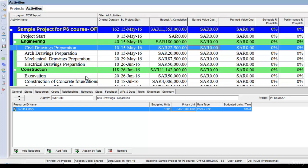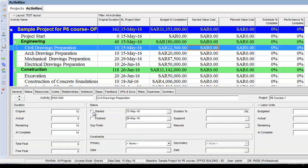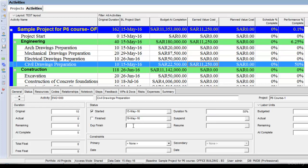Now the project has started and I'm going to record progress after five days. The current data date is the 20th of May. I'll go to the stats option, click start, and put the activity completion as 50%. So civil drawings preparation is 50% complete after five days. You can see the performance percentage complete is 50% and the earned value cost is $11,250, which is 50% of the budgeted completion. The earned value cost is calculated by multiplying budgeted completion with the performance percentage complete. The schedule percentage complete is still 0% because I have not yet scheduled the project with a new data date.